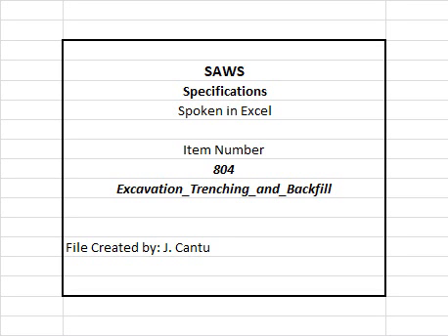3. ASTM D2922, Density of Soil and Soil Aggregate in Place by Nuclear Methods, Shallow Depth. 4. ASTM D1556, Density and Unit Weight of Soil in Place by Sand Cone Method. 5. ASTM D2216, Lab Density of Water Content of Soil and Rock. 6. ASTM D3017, Water Content of Soil and Rock, Shallow Depth in Place by Nuclear Methods, or most applicable approved